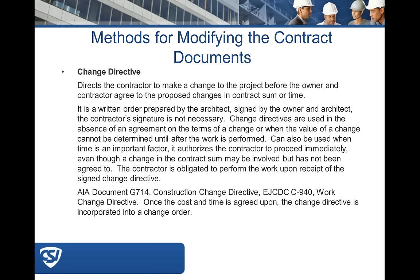We have a few questions. One commenter notes that on all their projects, the AE issues an ASI, but it actually should be a proposal request because it costs extra time and money — the AE depends on the contractor to determine if it's an extra. Another comment describes experience with change directives on three projects that ended up requiring the owner to go to court to recover money, which is why they lean toward Consensus Docs in those situations.